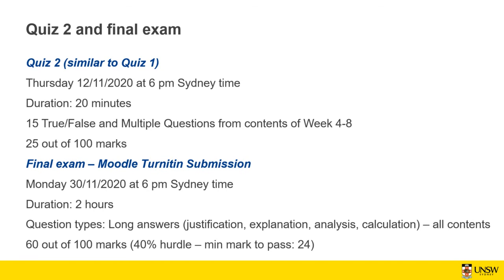Okay, BAC is the budget at completion. So how much money are you going to spend to complete this project when you do the planned value? Let's say that's again the house renovation. You want to spend 100,000. So this is the budget at completion. You want to spend 100,000, and this 100,000 you put for